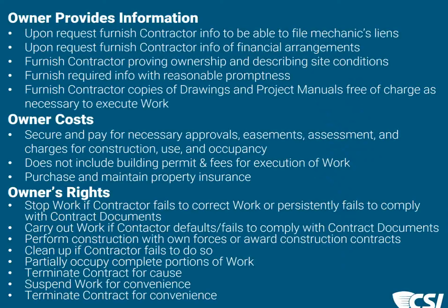Now, the owner may look to us for recommendations and involve us in a discussion about stopping the work, but that is not something that we do. It is something that comes from the owner to the contractor, and it's one of their rights.